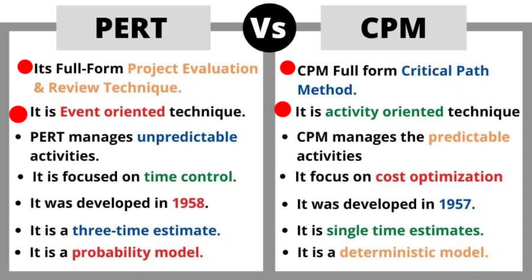In the second point, PERT is an event-oriented technique and CPM is an activity-oriented technique. In the third point, PERT manages unpredictable activities and CPM manages predictable activities. In the fourth point, PERT focuses on time control whereas CPM focuses on cost optimization.